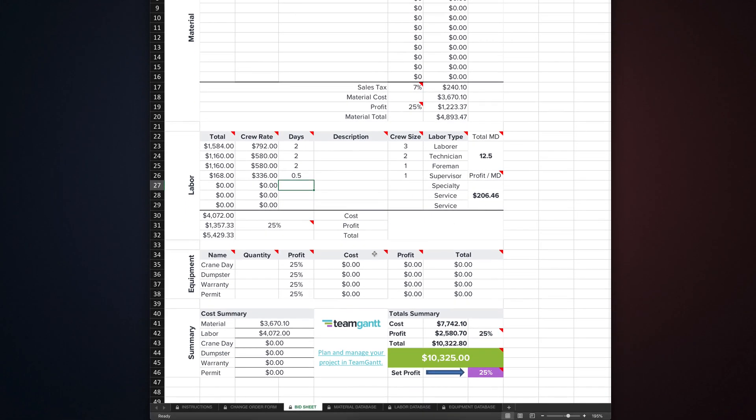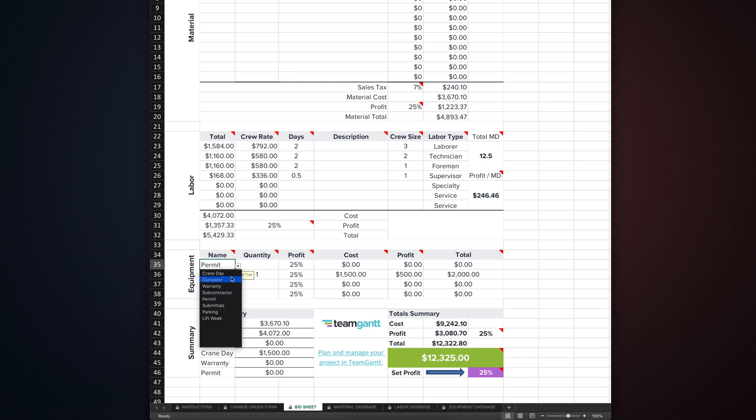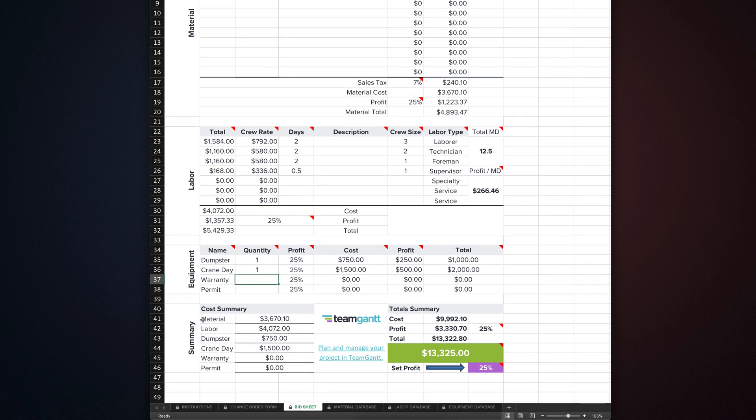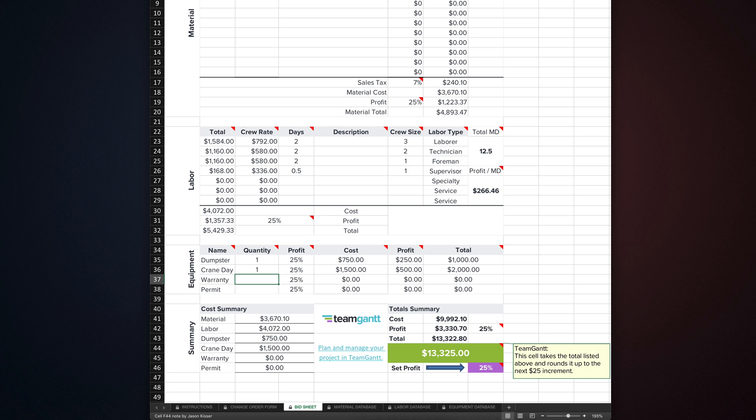The equipment section is where you estimate any equipment, expenses like permits or parking, additional resources, or anything else you want to price in the change order. Just like in the other sections, it's pulled from the equipment database tab. And like in the labor section, you can't directly enter new equipment here, but have to add it in the equipment database tab. Enter the quantity of your selected equipment, and you'll see its profit and total update. Once again, don't adjust the profit cell just yet. The summary section gives you a breakdown of your costs for the change order without profit. Your total change order cost amount, total change order profit amount, and your total for the project. You'll notice the big green cell displays your total rounded up to the nearest $25 increment. Once you're completely finished with your change order, the final thing you want to do is change this cell to what you want your final amount to be. This is the cell that generates the total on your change order form.